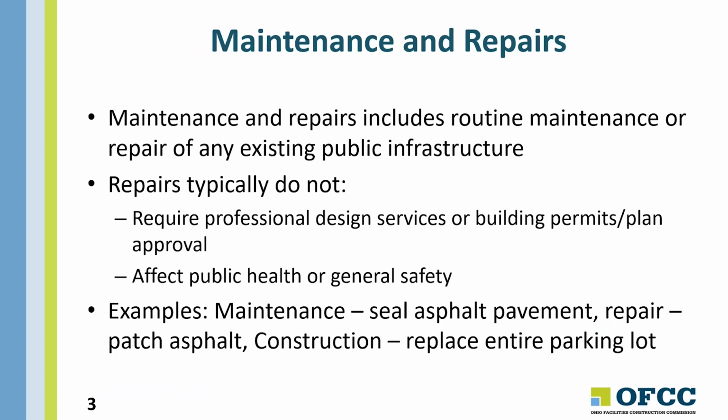So for a maintenance project, you might be sealing your asphalt pavement. You may be repairing or patching the asphalt. You're doing pothole repair. But if you're doing construction, then you're looking at replacing the entire parking lot. You may be grinding and laying down a new wearing course on that lot. So maintenance is something small and isolated, and construction is a major upgrade.